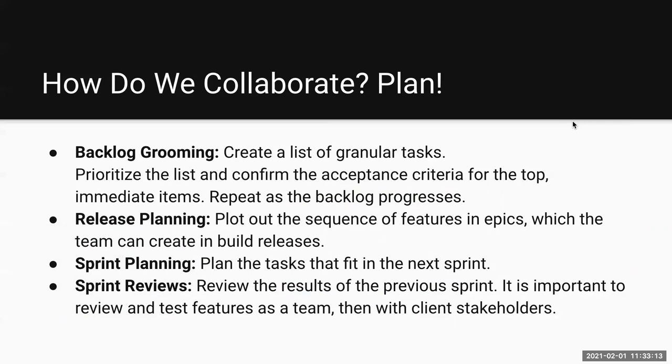So first is backlog grooming. What are the things that we can do? How do those individual tasks fit together, who needs to do what, and how do we not get in each other's way? What can happen sequentially? What can happen concurrently? And that takes a team's conversation.